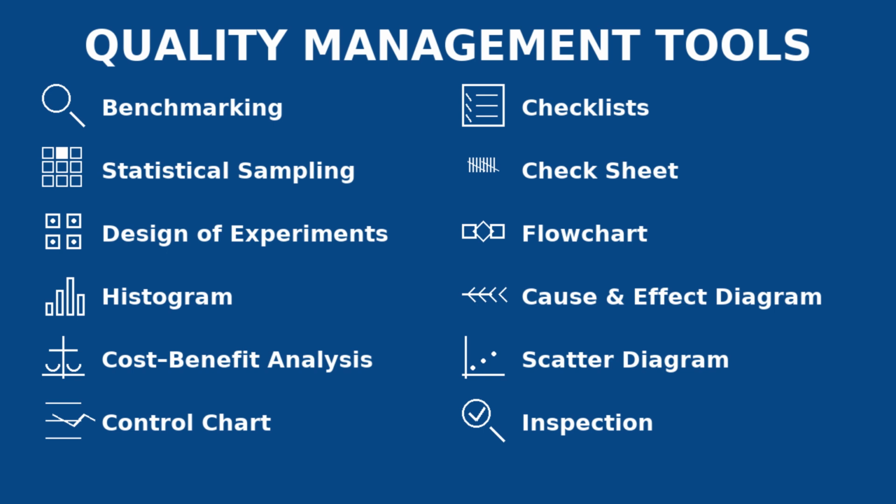or improvement points. We are talking about the next person in this room. He is looking into issues that have been listed graphically, issues that have led to a defect. He is going to check if the process can be improved. He is trying to use the cause and effect diagram, Fishbone or Ishikawa diagram. This diagram is a tool where you identify root causes of a problem by categorizing contributing factors.